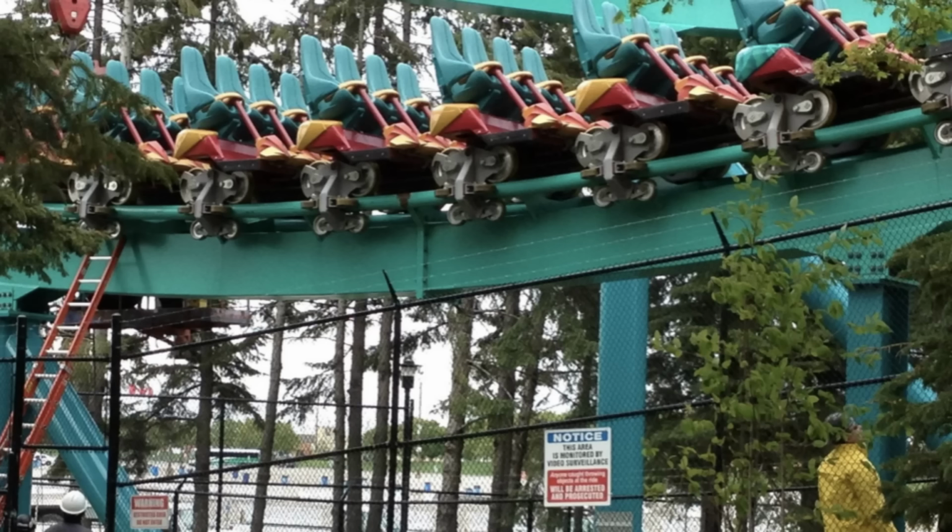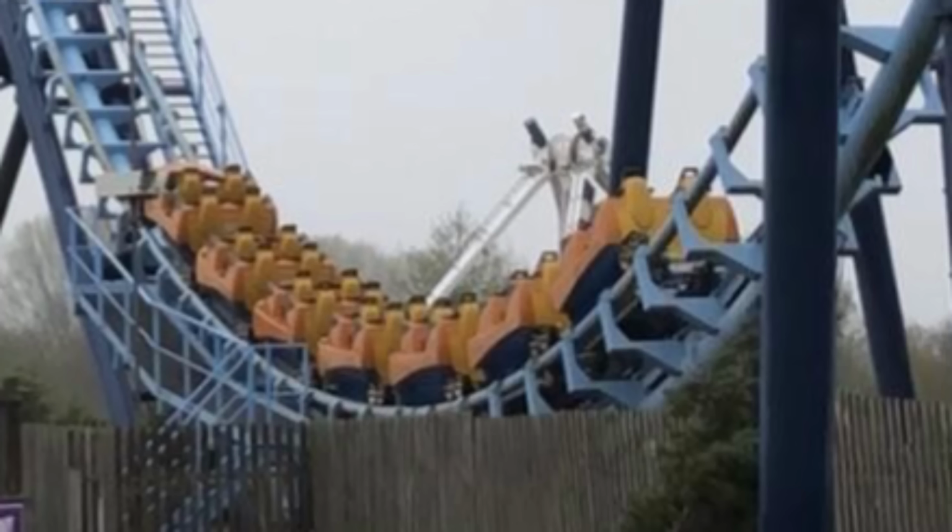We've actually purposely assembled trains loose before, like physically loose. We didn't tighten the hitch nuts down and stuff to where they were supposed to be. We left them loose just a little tiny bit so that the train would break in. The lap speeds were fine, and then I went back to hitch number 9 and tightened it properly. Lap speed was fine. Okay, run it again. Tightened number 8. It's like, all right, slowed down a bit that time. But we ran it a second, third time. It's like, okay. Then I did 7, 6, 5, 4, 3, 2, and 1, all the way back up to the coach. And the train was still running consistent times. That's what you look for when you're load testing trains. You're looking for consistent times.